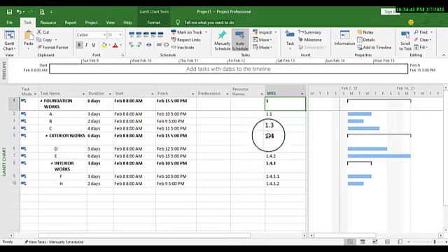Now let's come to the WBS exterior works. The exterior works has a number 1.4. So it means that all the activities beneath it will take the 1.4, including their own number, starting from the first number.